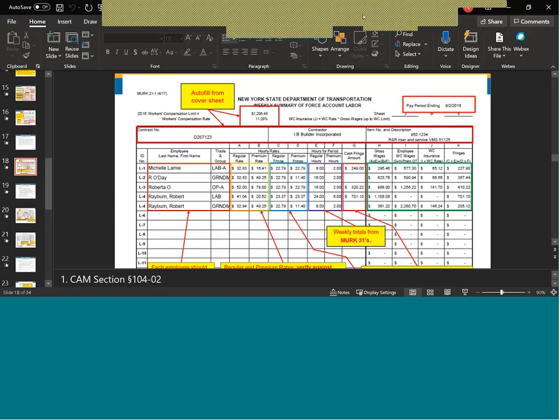And then the 249, if you were to just enter 249 and not put a rate in for your fringes, then the subtotal, they're not going to be reimbursed. All that'll happen is the 6.4% will get applied to the 249, and the workers' compensation and reimbursement will include the cash fringes. But the fringe total itself will not get carried over to the MERC 20 labor subtotal. So make sure that you enter the cash fringe, the regular fringe rate and the cash fringe amount on your MERC 21s.